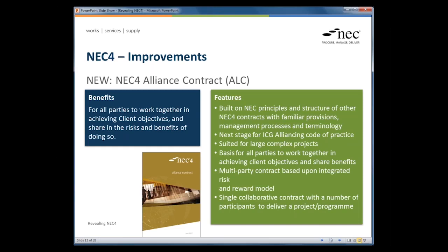Okay. And so while I say it's a different approach to other NEC contracts with a multi-party arrangement, I think it's still right to say that a lot of the good practice within the standard NEC contract sits within this, the early warnings, the compensation events. But what we're trying to do now is get people to have early warnings being raised jointly so that all the participants are encouraged to do so, to share problems, share issues, to try to mitigate impacts, regardless of who actually may, within that overall team, suffer a consequence.